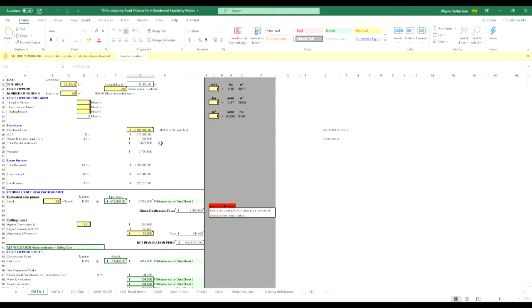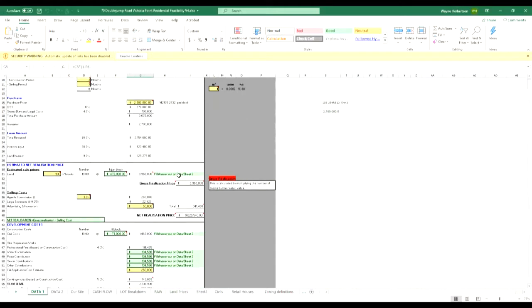You've got to have 3 million cash. But the way we've staged the option document is that we're going to just pay $270,000, 10%, to hold the property for the period of time, for the 24 months. So it reduces your holding costs.